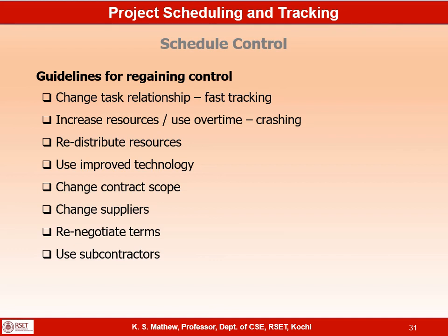The second option could be to add more resources. If you find that there is a slippage in one activity and the project end date, you can add more resources to advance the schedule or overcome this schedule slippage. That approach is normally called crashing.